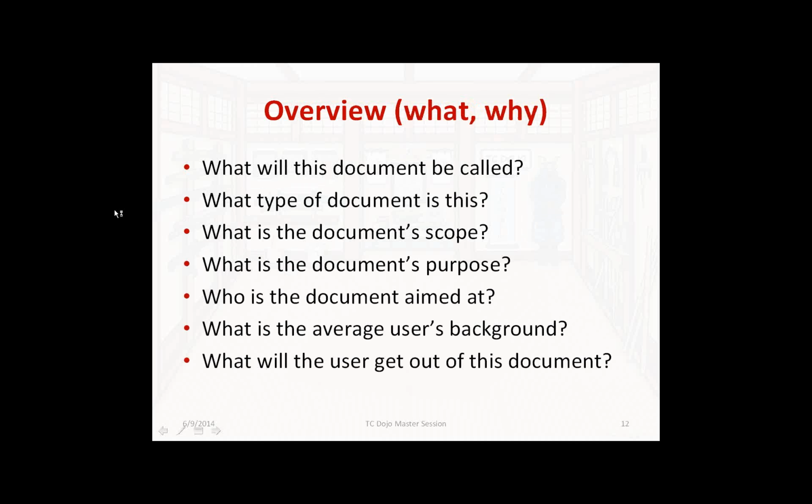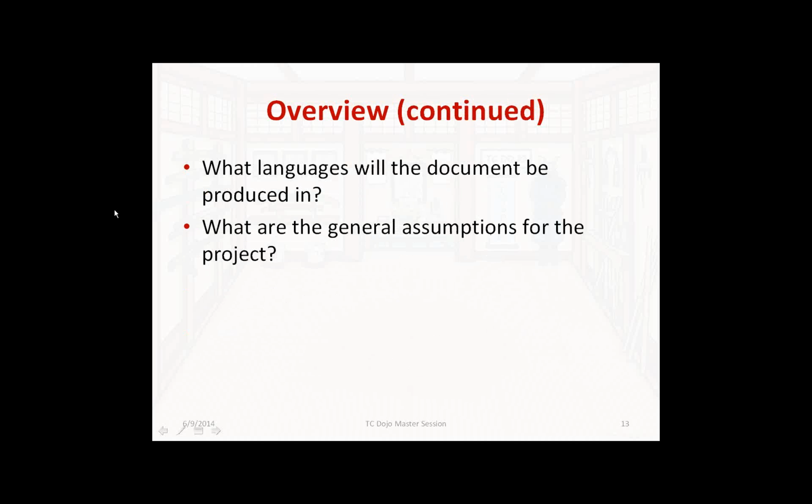Such as, you, the writer, will be responsible for writing and reviewing content, working with the editor, and list the responsibilities also for, say, the developers you're working with or other people, so that if nothing else, you're nailing down that you are not the person who is responsible for, let us say, in terms of software manuals, reading the code to determine what the APIs are, which is occasionally something you can get saddled with.